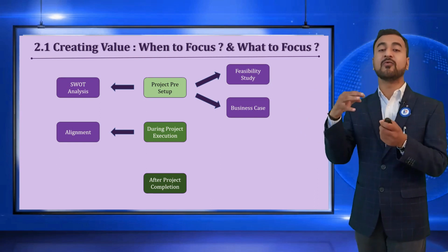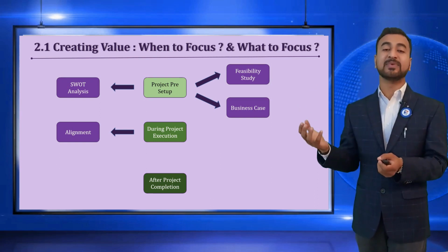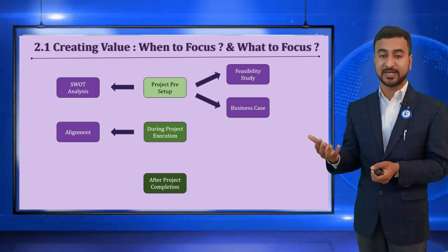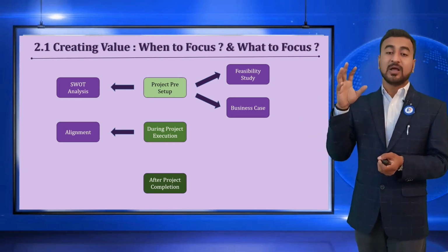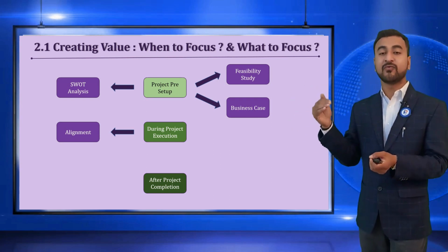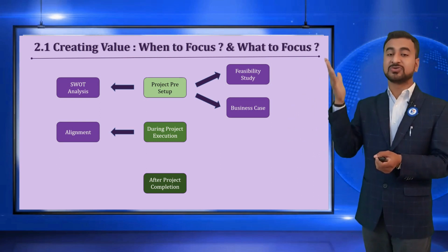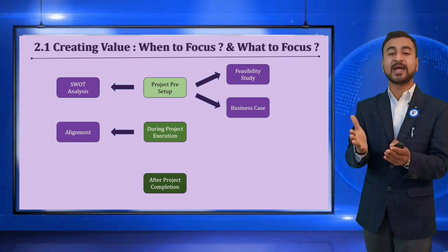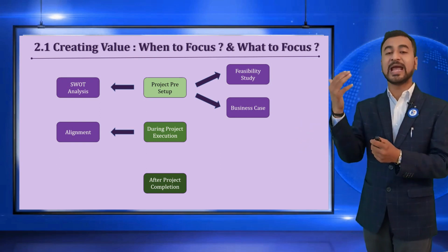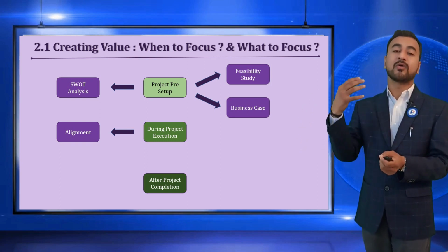So they transform that: how can we develop an IT-enabled capability to provide a virtual classroom kind of setup? In that case, your project of creating a school building is no longer valid for your organization's strategic objectives. So ideally, you should scrap that project and invest those funds into the infrastructure for creating IT-enabling services or virtual classrooms.